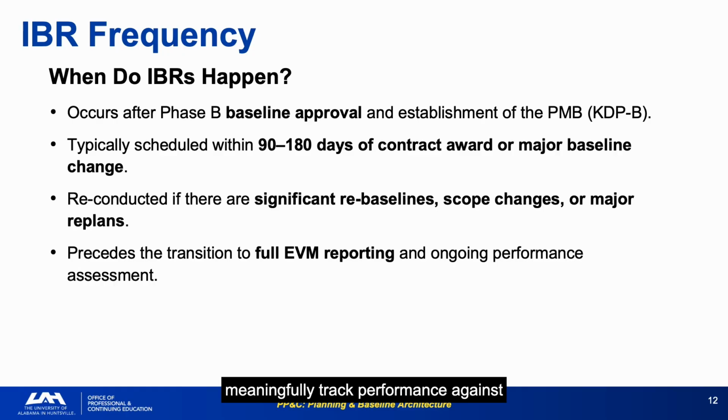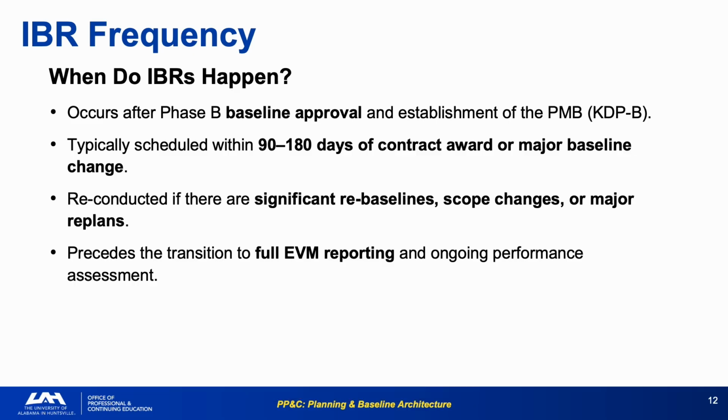The IBR must precede full EVM reporting. You cannot meaningfully track performance against a baseline that hasn't been validated as executable. The IBR is the quality gate before performance measurement begins. Programs that receive contract awards in the middle of a fiscal year often feel time pressure to compress the IBR process. Resist this. A compressed IBR that misses planning deficiencies will produce 6 months of misleading performance data.